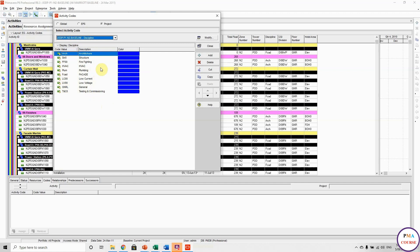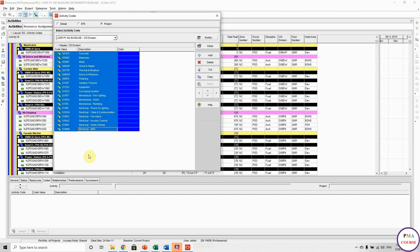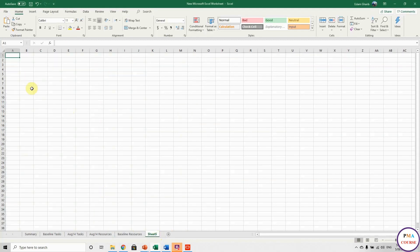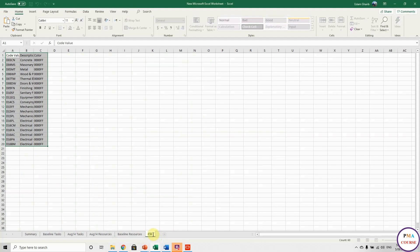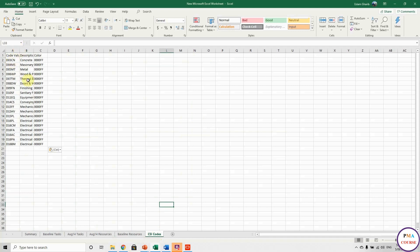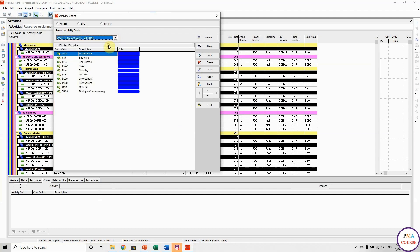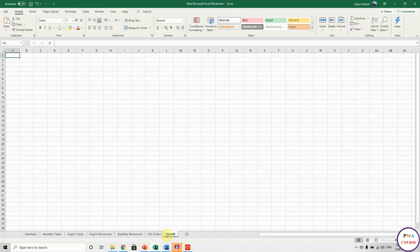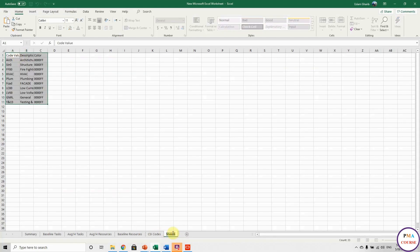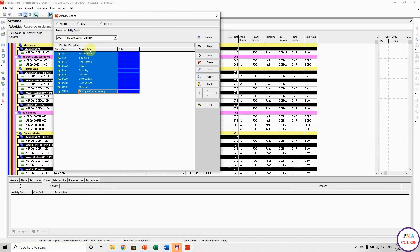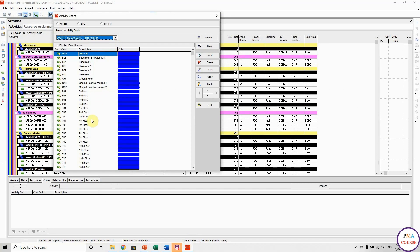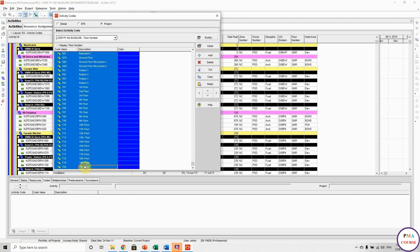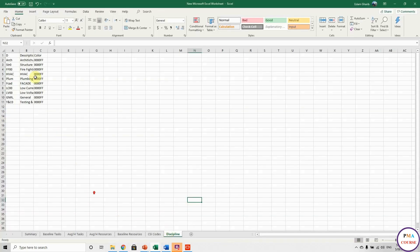I call it 'activity code dictionary'. In order to link between the activity table and the code description, I will create something called a dictionary. So I will copy-paste here, then go to our Excel sheet and paste it. Remember you have to rename everything. This one I call 'CSI code'. I will do it again for the second one — discipline. Take everything, copy-paste, go to open new tab, paste it here, and rename it 'discipline'. And let's go for the next one: floor number. And so on.